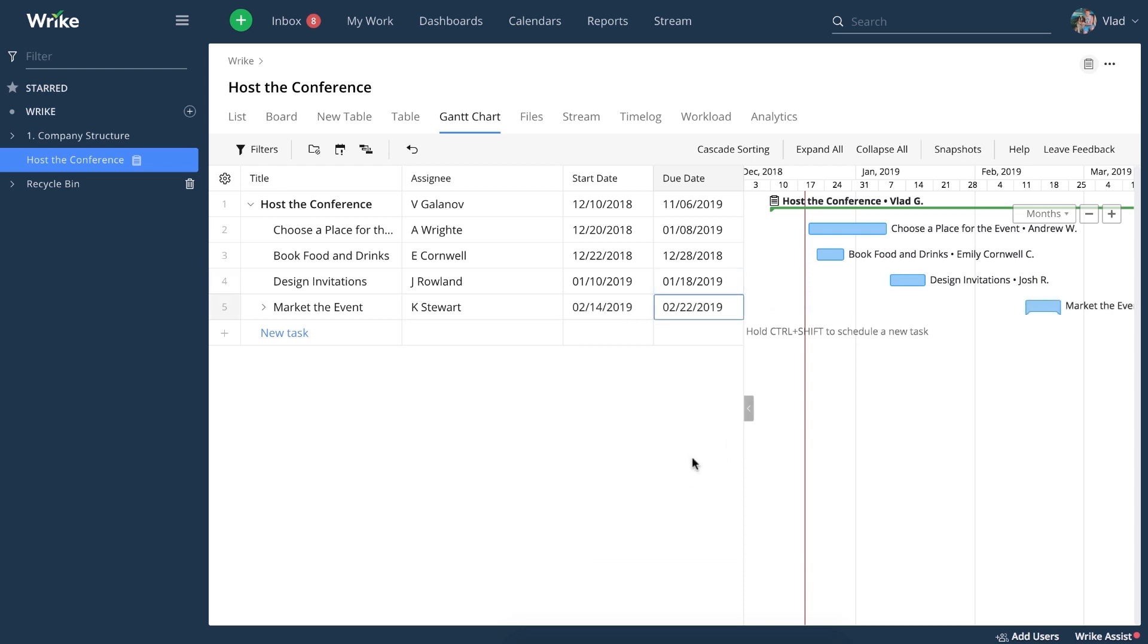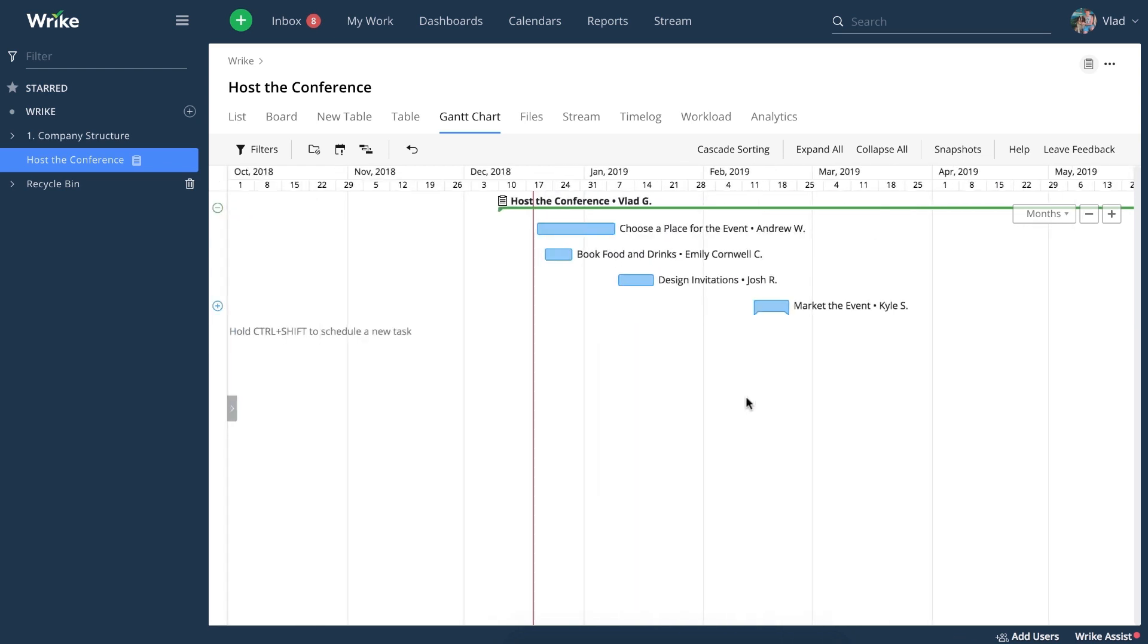Now that you're done with that, you can hide the table view. Now say that right after you choose a place for the event, you need to order food and drinks. That means there's a clear dependency here and you can define it using this little circle.